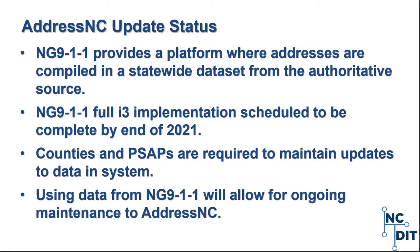In terms of the update status for AddressNC, we are seeing the Next Generation 9-1-1 project as the platform to receive address data directly from the authoritative source — the local governments. The full implementation of Next Generation 9-1-1 using the I3 standard, where GIS data is being used throughout the state for 9-1-1 call routing, is ongoing and hoping to be completed by the end of 2021. With the Next Gen project, counties are being asked to provide updates on a monthly basis, and since counties and PSAPs are required to maintain updates in that system to ensure proper call routing, we are seeing this as a way to provide ongoing updates to AddressNC — which has never been accomplished in previous efforts.